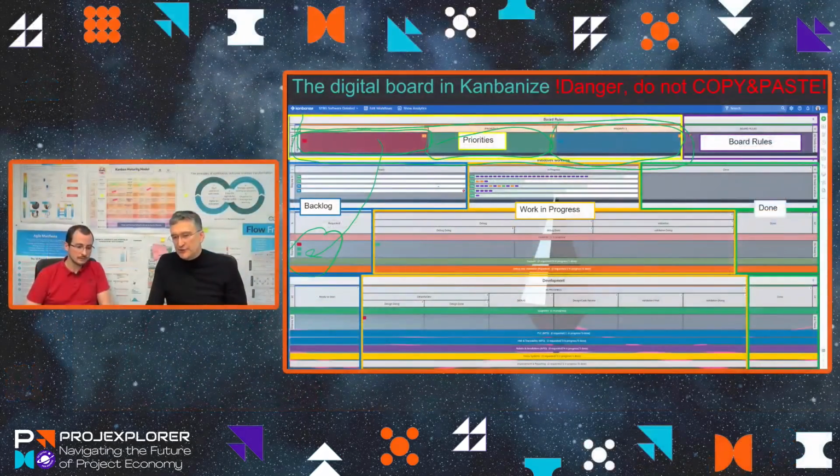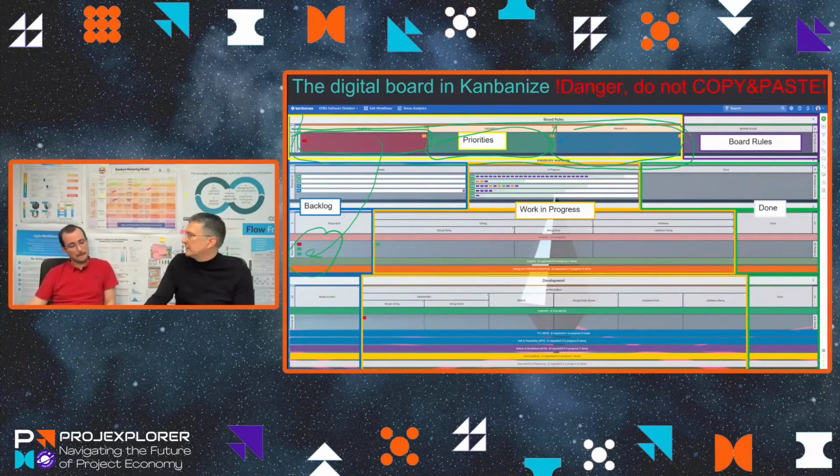We have a separate type for upgrades only, where we just put things that we know are going to take less time for development than the whole machine. Of course, the whole machine takes a couple of months, where an upgrade can take a couple of weeks. So we have a separate type for it, and we can analyze it separately. What was important is that for each type, you can have statistics, so you can know how much time it would take in 95% of the cases to do the development of a PSL or some other things. You can extract all these statistics directly from the software.